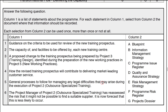Statement five: general processes to follow for managing any legal difficulties that may arise during the execution of project two. That's looking at some uncertainty — something that may happen in the future — therefore we're looking at risks. Those processes will be documented in the risk management strategy, and that's letter E.